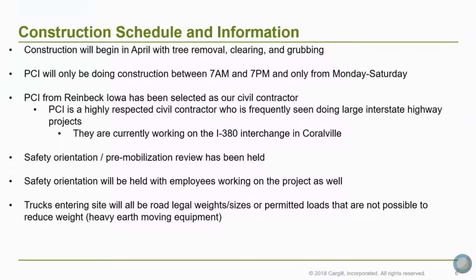All of the trucks that are entering the site will all be road legal weights and sizes, or permitted loads if it's not possible to reduce the weight. So an example, some of the heavy earth moving equipment that we'll use, it's just not practical to take those apart and get them to a road legal status. So those will be permitted loads with the state, the county, the city as needed. But the trucks that will be coming with materials will all be road legal.